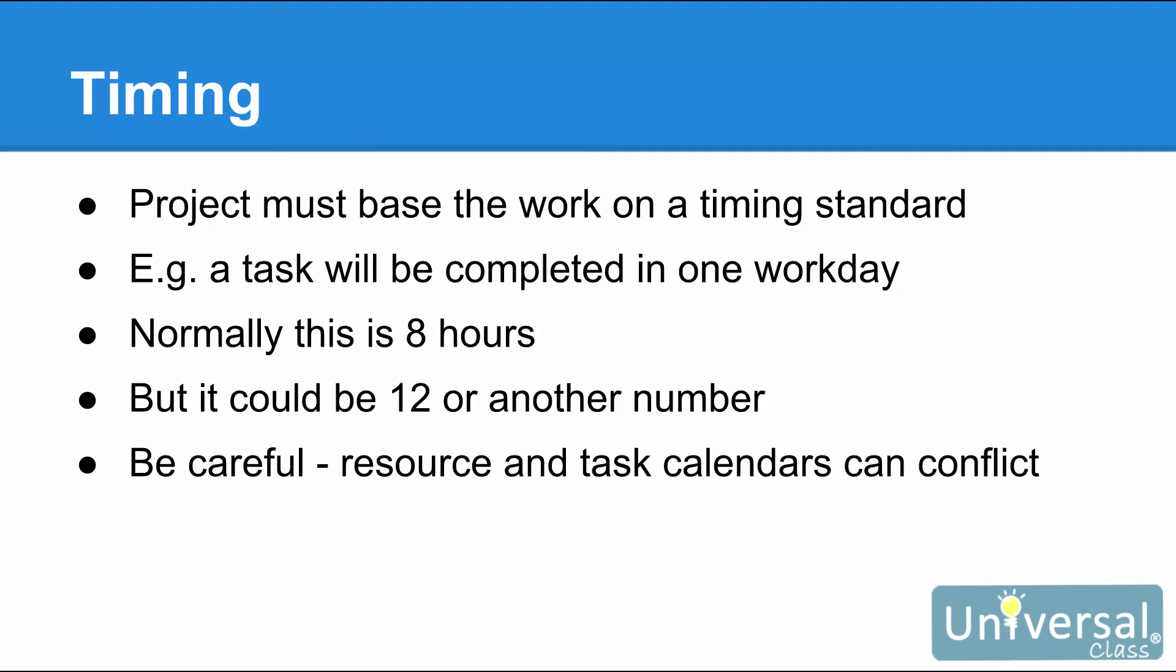By the same token, if you set up a resource that will be used for 2 weeks of work, measuring weeks by a 5 day work week, it will show a timing of 10 work days, not the standard 14 day period that typically comprises a 2 week period.